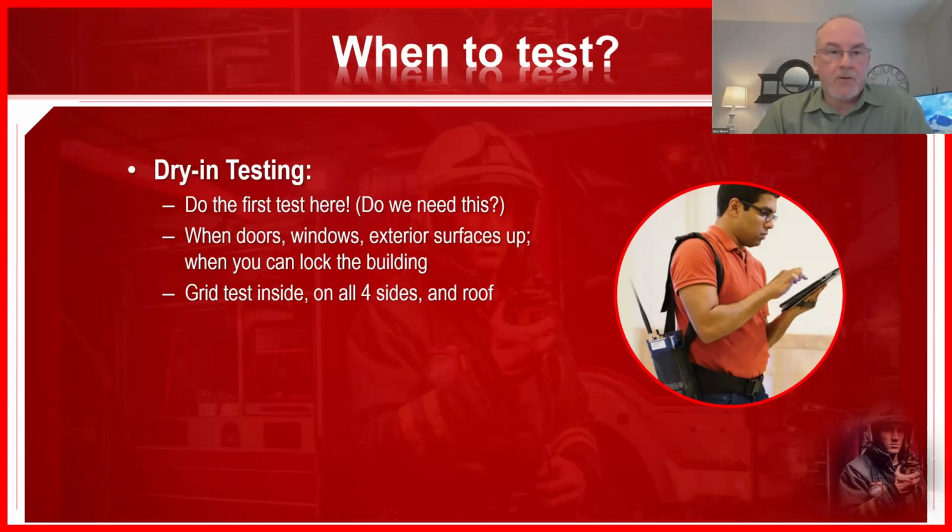Now, someone asked me once about drop ceiling. So we need to wait till the ceilings are in. You generally don't have time to do that. Yes, that will affect the propagation slightly, but with a trained integrator who knows RF and knows that area and does this test, they'll be able to tell you based on that initial test. Regardless of what you do with your ceilings, you're going to need one, or vice versa. Okay, they can tell you won't need one.